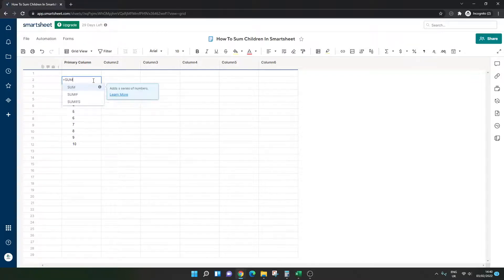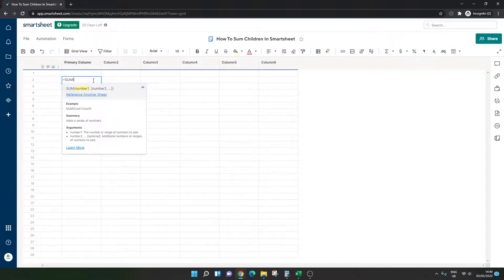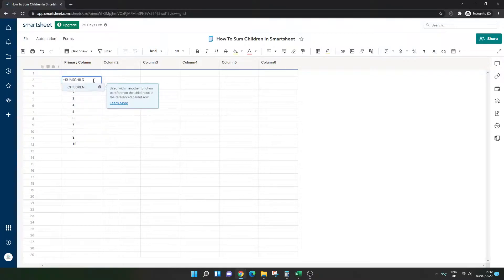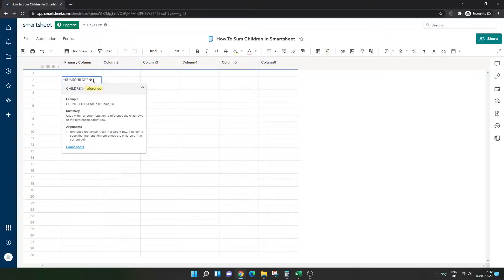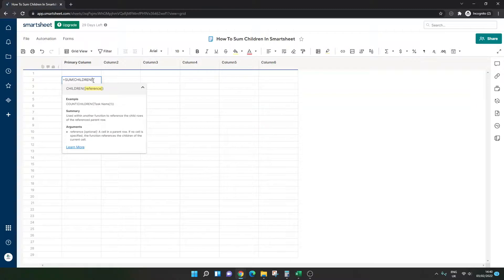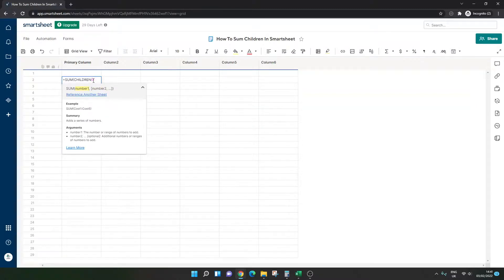So equals sum children. Now, what you need to do here is open. So essentially, the second part is the reference. And we don't need there to be a reference because we just want to sum what's underneath. So basically, we're creating an empty reference. So open brackets, close brackets, and we need one more close brackets.